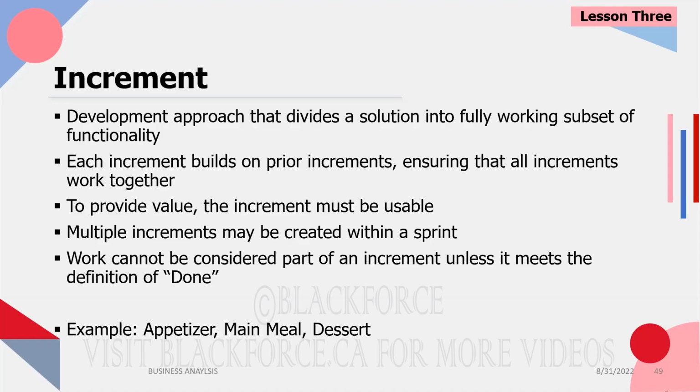Okay? So let's go back to our text here. Each increment builds on prior increments, ensuring that all increments work together. To provide value, the increment must be usable. What we mean by that is, when you build the login page, complete the login page, complete register. You cannot show register functionality to the user if they cannot complete that registration, right? If they cannot complete it, it means it is not usable. So your increment must be usable.